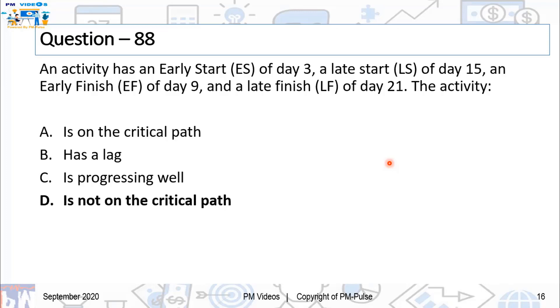And the correct answer is, it is not on critical path. You see, all you have to know is that if there is a difference between late start and early start, they are not the same date. That means they are not on critical path because the calculation of float is late start minus early start or late finish minus early finish. And if it is zero, it is on the critical path. But right now, we can see it is not on the critical path. And therefore, the value is not zero.